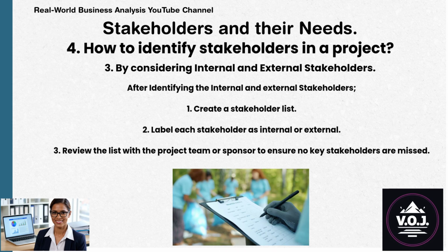After identifying the internal and external stakeholders. 1. Create a stakeholder list. 2. Label each stakeholder as internal or external. 3. Review the list with the project team or sponsor to ensure no key stakeholders are missed.